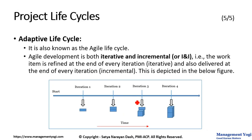The last life cycle is the Adaptive Life Cycle, also known as the Agile Life Cycle — agile and adaptive are used interchangeably. The Agile or Adaptive Life Cycle is both iterative and incremental — I call it the I and I life cycle. The work item is refined at the end of every iteration, and you are also delivering incrementally at the end of every iteration. So you are combining both the correctness of solution and fast delivery.